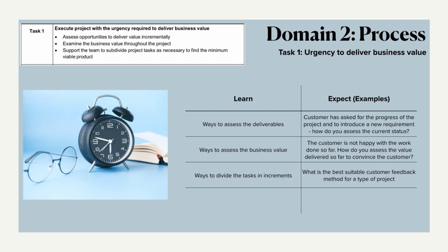So what happens in the agile kind of working is that the stakeholders come up with a set of tasks they need to perform before the set target date, and these target dates are again in recurrence. Every 2 weeks a sprint will end, or every 3 weeks a sprint will end. So it is in such recurrence. When I say sprint, that is a set target date for a set of tasks, and there will be a scrum master who will be assessing the workload within the team, and then he will assign only those portion of tasks which are possible to be delivered within that 2 week sprint or 3 week sprint.